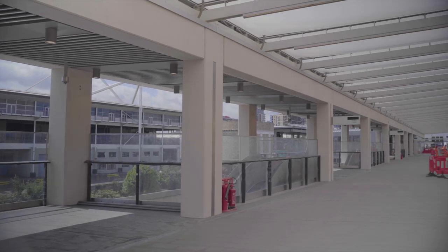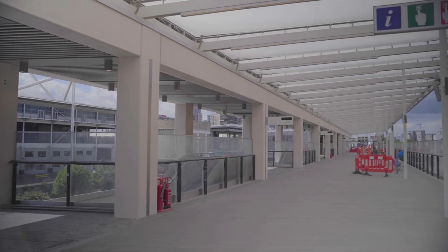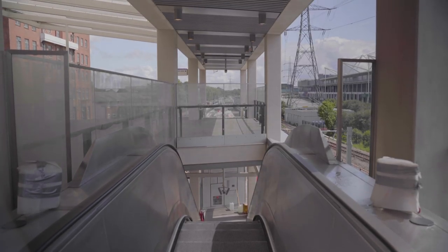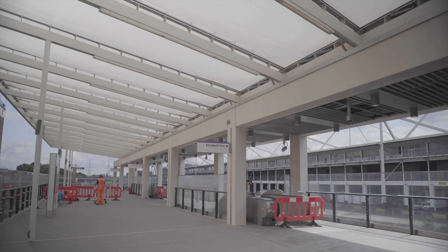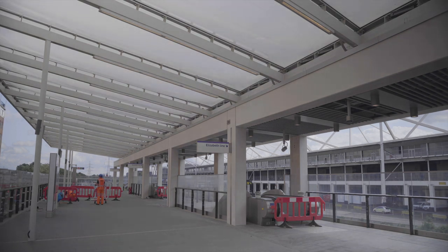The station is progressing really well. We have just completed all our scenario testing, which is basically the integration of all the systems with every other system. So BMS, making sure that's talking to the lifts, escalators, making sure everything's running concurrently. Just in the finer details now, going through snagging, installing the last few sections of work.